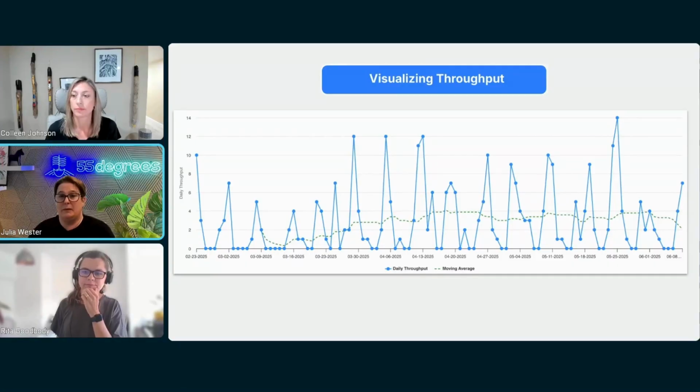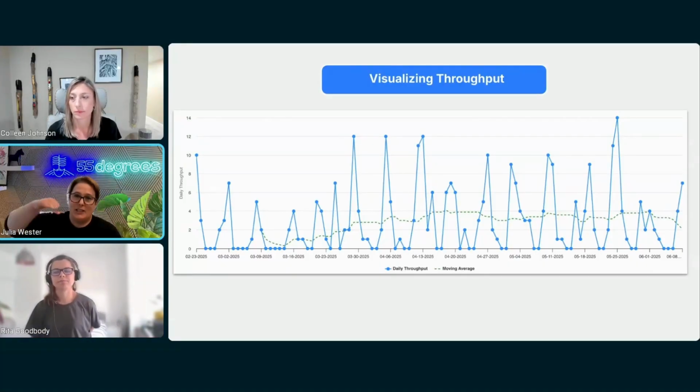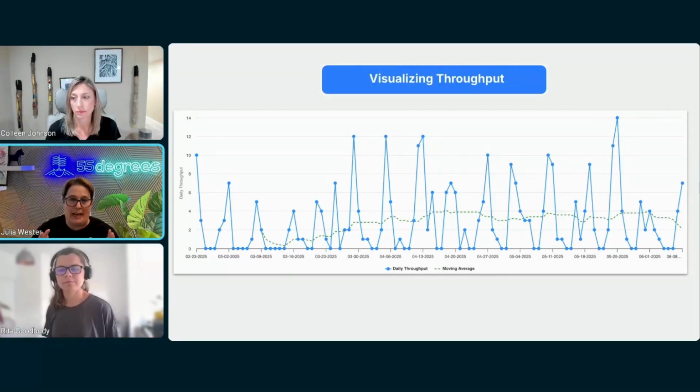So all of the same things that you're looking for in that WIP run chart, what's our range? What's our variation? Is it trending up? Is it going down? All of these different patterns. Those are the same questions that you'll probably ask on any kind of chart that looks like this. And again, the answers aren't going to be here. You're going to have to go investigate the weirdness. I can see some things here, like occasionally I have 2 dots at 0 on a regular basis. That's the weekend for our teams because we don't work on the weekends. But occasionally things might happen.